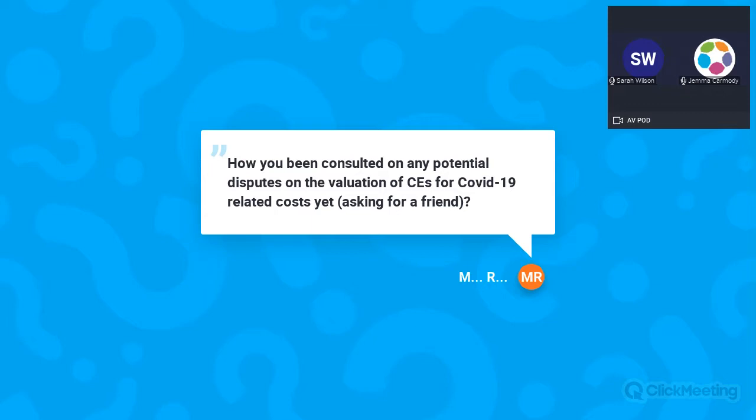They were very quick to hold their hands up there and award it. But when you look into it, actually, the real cause of the delay is something else, which typically is an employer delay, which would entitle the contractor not only to an extension of time but to loss and expense as well.